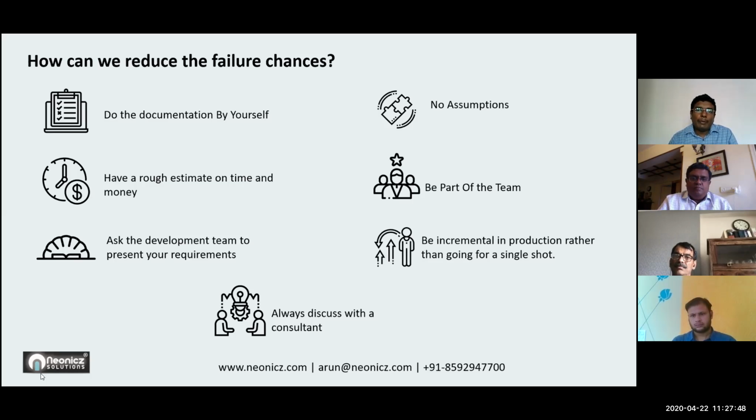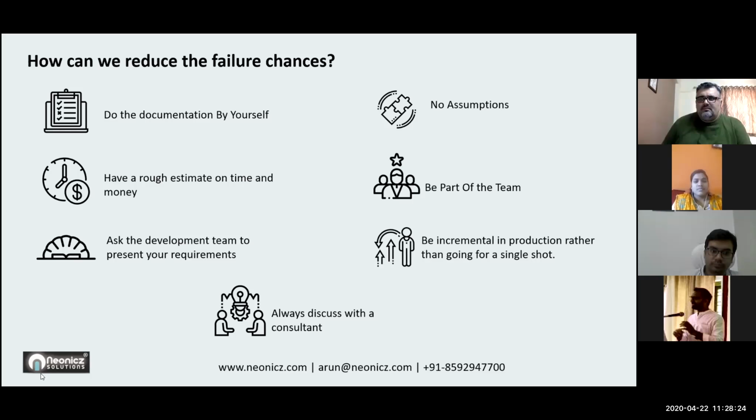What the developer thinks is, the customer shared the requirement of the registration, and he developed the registration, but he didn't check whether the user or the email ID had already registered. That was not explicitly conveyed to the developer by the customer. So ultimately he delivered the product without that cross checking. A lot of duplicate registrations were happening and being allowed, which affected the login feature of that product. So the product miserably failed on its first release.